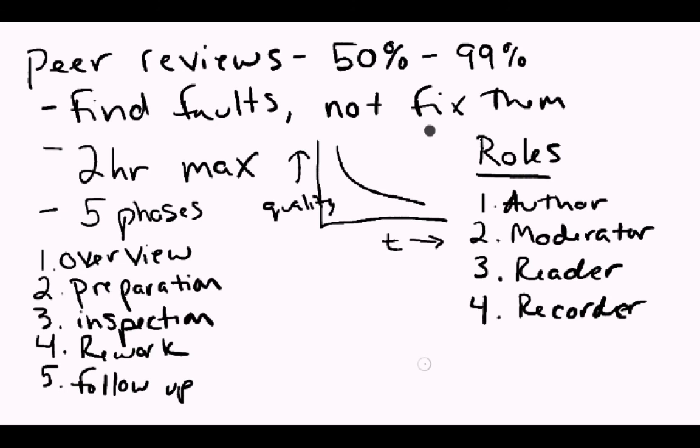If on average this group averages maybe 30 minutes per 100 lines of code, and some code review is outside those norms, somebody's going to have to answer to that. Why did this code review take an hour per 100 lines? There might be a good reason for that, there might not, but we want to have the management team always be aware of the statistics that are involved with a review.